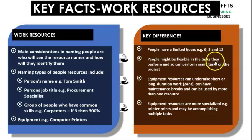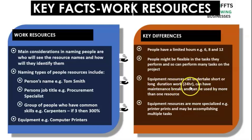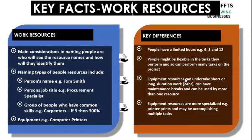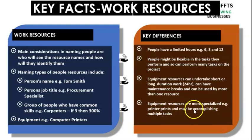People might be flexible in the tasks they do and can perform many tasks on the project. Equipment resources can undertake short or long duration work — you can work equipment for 24 hours. They have maintenance breaks and can be used by more than one resource. You have to be very careful when allocating equipment that you don't allocate the same piece of equipment to two different tasks or people at the same time, or you will over-allocate the resource. Equipment resources are more specialized — a computer printer prints.